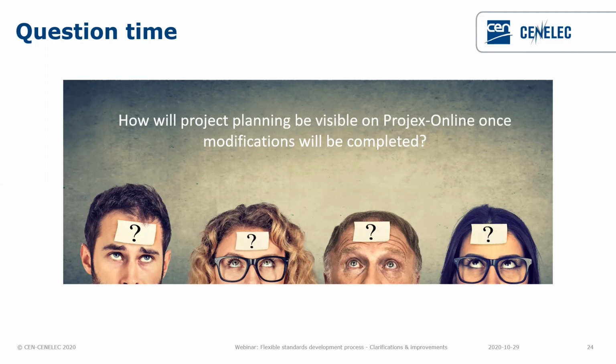And then we had another question about the possibility to use the one change option. Can we use it once or can we use it several times? Actually the response is one time only. You will be able to use the one change option only once, but of course keeping in mind that once you have used this option, you will still be able to introduce a tolerance request if you are still late in the development process. And that's it for the time being.